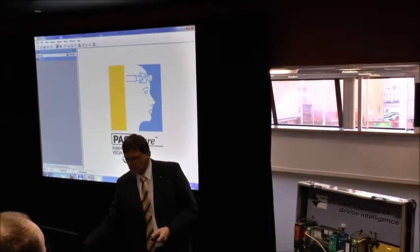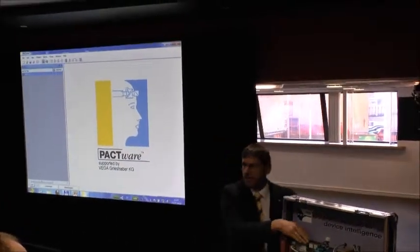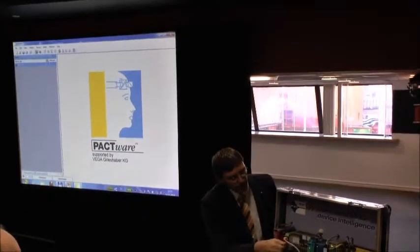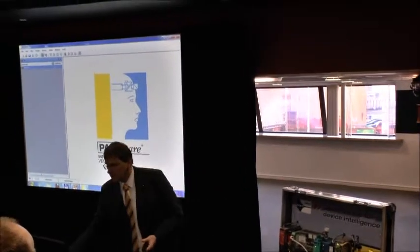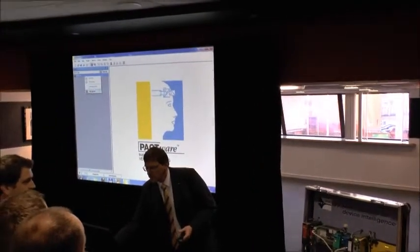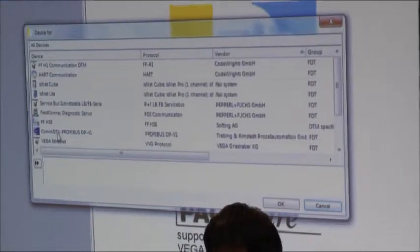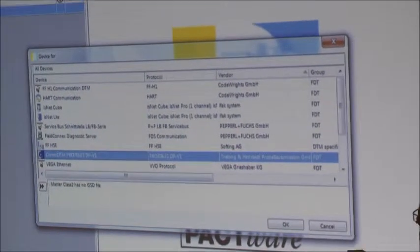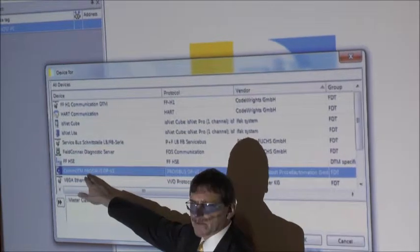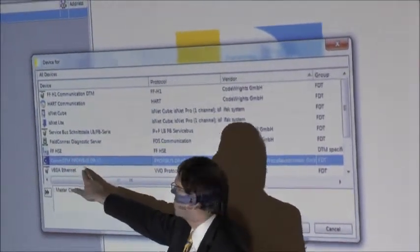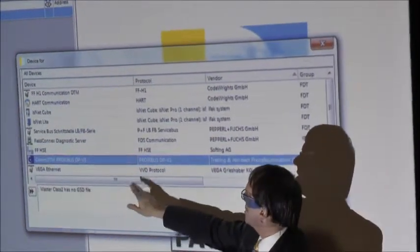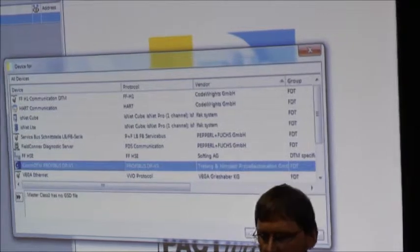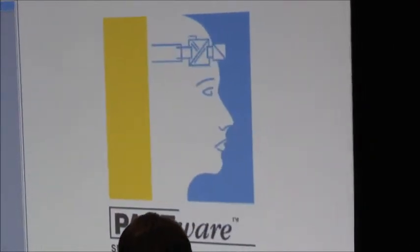What I have to do to make the commissioning: I have to add the drivers of the hardware. For the first thing, I have a connection to the switch. The switch has no DTM, it is only a switch. But from the switch it goes to the Ethernet cable. So I add the DTM, the driver of the Ethernet cable. I add the device.